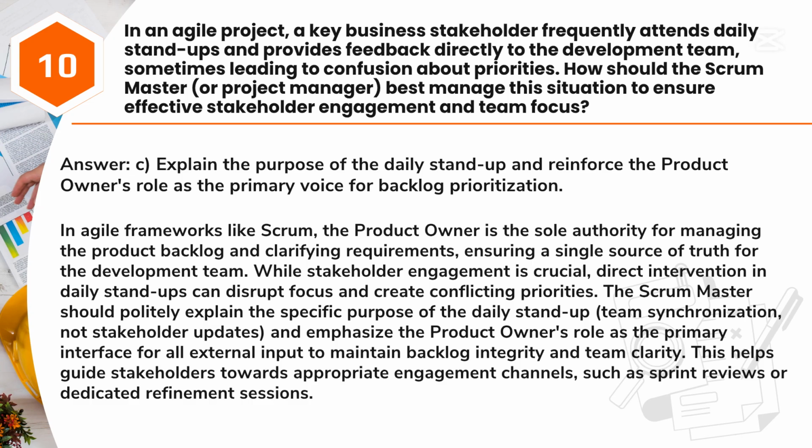direct intervention in daily stand-ups can disrupt focus and create conflicting priorities. The Scrum Master should politely explain the specific purpose of the daily stand-up, team synchronization, not stakeholder updates, and emphasize the product owner's role as the primary interface for all external input to maintain backlog integrity and team clarity. This helps guide stakeholders towards appropriate engagement channels, such as sprint reviews or dedicated refinement sessions.